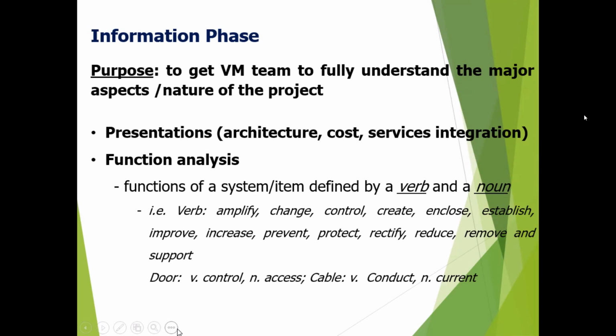Any impact? There may be a ventilation issue or a privacy issue. If those arise by removing the door, you should not do that. So it's important that functional performance is maintained at the same level with the reduced cost. That is what we call value enhancement.